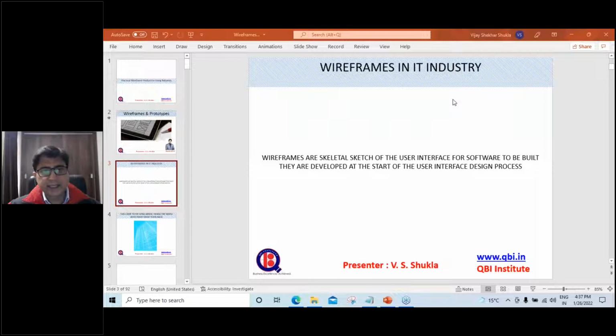So a software is getting developed. We capture what we are going to develop through multiple outputs. Many of those outputs are documentation outputs. Say we write a user story, say we write a vision statement, we prepare a business requirement document. So here is yet another view. This view is a visual view, and this view covers how the user interface of the software is going to come up when the software is delivered. So a wireframe is a very good requirements development technique because the client has some upfront idea of what we are developing.